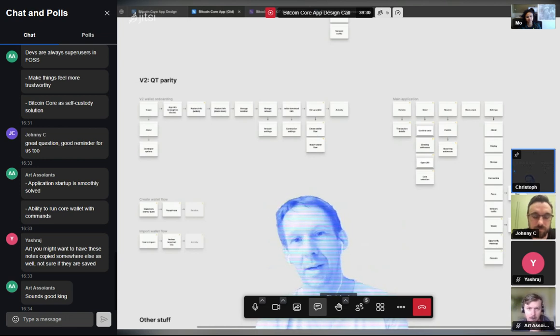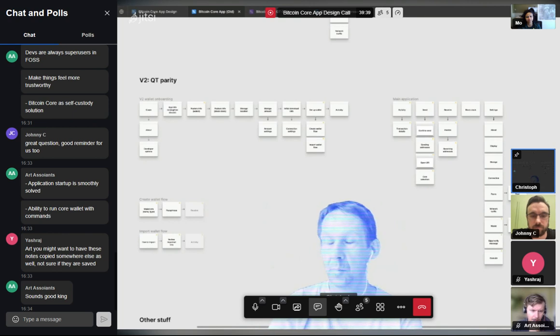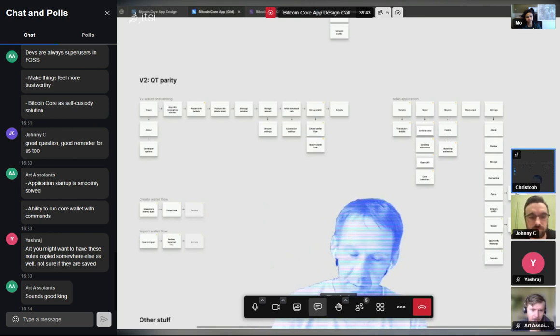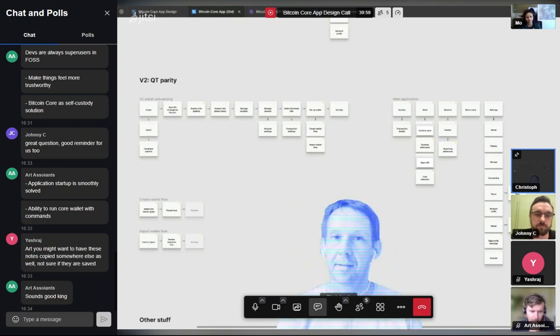Then we have these milestones. And then I'd like to organize a design process around that. For this 1.1 polish thing, we should specifically say what's in there, what isn't, and we should create GitHub issues for each of those. In GitHub, you can use milestones to group them, and we can create a project. It's basically what we have for the design guide. BTC Pay uses that, a good pattern that we can use there.